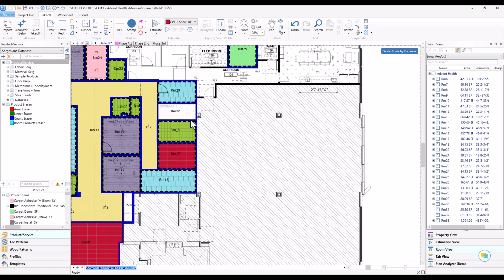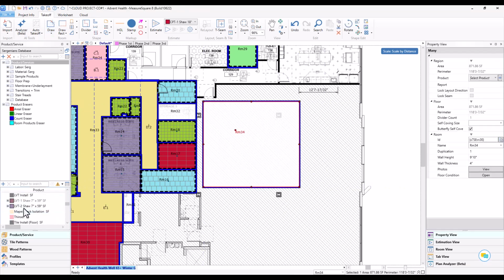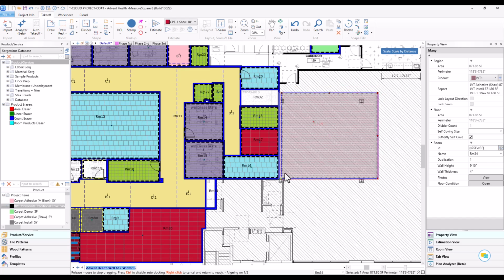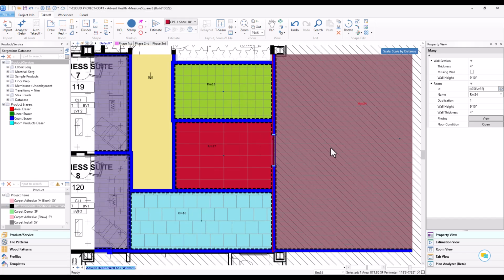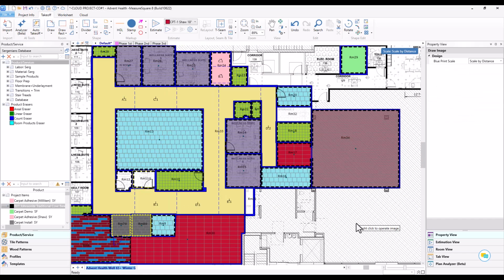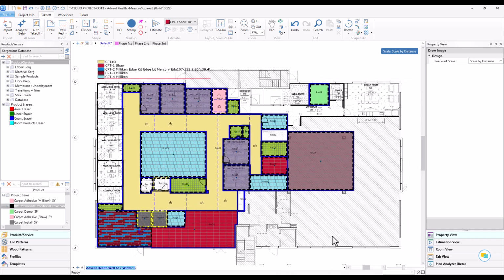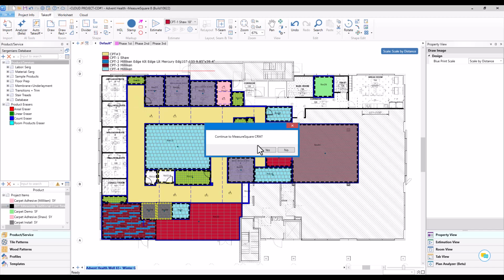And also they added a big area on the right side, which is going to include some LVT and some base. It doesn't matter what your changes here are. Really, all that matters is that you enter the changes into the takeoff and that this new takeoff accurately represents the scope of your change order. So we could say this looks good, and I'm going to quickly click Save in the top left. And the system will bring me right back into the CRM.